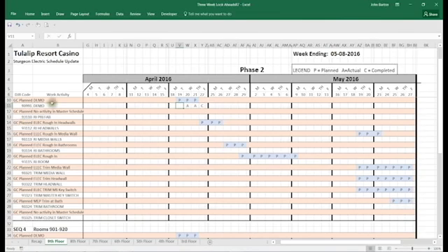Now you're going to see that these are GC planned activities that are kind of highlighted in this orange color. And that's really what the general contractor schedule is going to say when they give you their look-aheads every week. When you're in a meeting, you're only going to see what's in the orange right here. You're going to see this one and each one of these activities. And you can see that where we're at right here, which is the GC planned, that there really is no activity in the master schedule. So we know that that's not going to show up in their schedule.